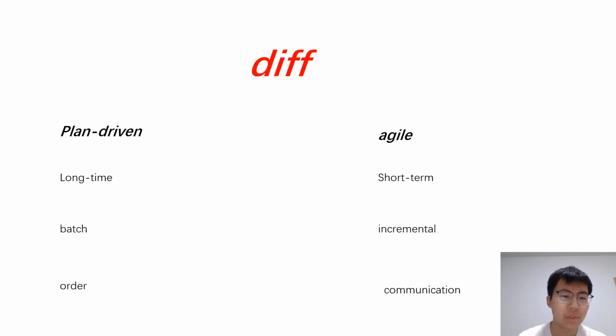Following that, we build what was planned. Next, we test and review the small feature set, preparing it for shipment. Once this cycle is complete, we have a potentially shippable product. This iterative process typically takes place over a period of 1 to 3 weeks.